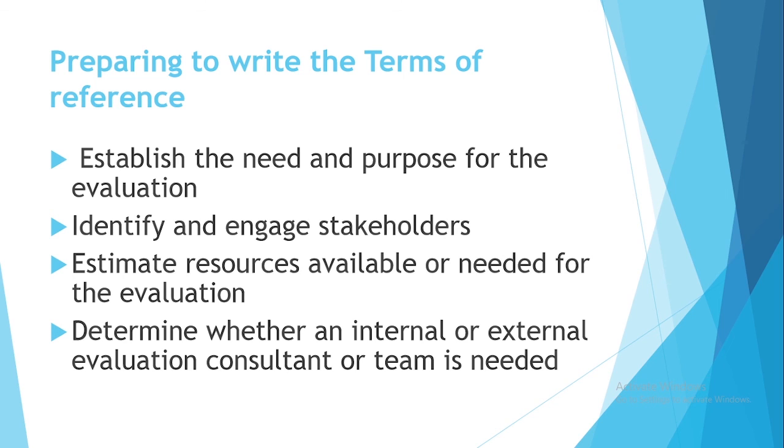So how do you prepare to write your terms of reference? 1. Establish the need and purpose for the evaluation. Identify and engage stakeholders. Determine resources available or needed for the evaluation. And then determine whether an external or internal consultant team is actually needed. That's it about terms of reference.